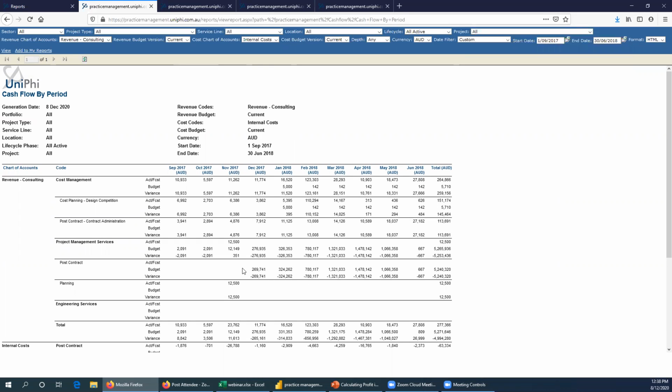And again, with another client we've got, it's interesting. They have a timing difference between when costs get recognized via that methodology. For example, payroll's a monthly thing, and then it takes time for the allocations to come into the projects via their accounting system, and they want to be able to track during the month how they're performing. And so they actually have a flip between the resource rates and the cost codes. If cost codes exist for that month for labor, then use that cost, otherwise use the resource rates times hours. That was a complicated little customization they got to their reports.